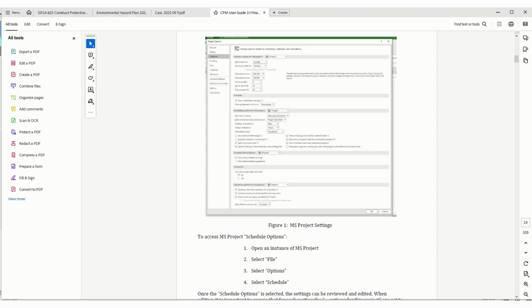It starts showing you your work elements, your labor resources will be here once we put the resources to it, your tools, your equipment, what materials are due, if it was a long lead item, all your QC points for this CAS sheet, your safety points for this CAS sheet, and the environmental protection plan for this CAS sheet. Okay, and then each CAS sheet will have a blank. This way it doesn't interfere with the last CAS sheet like it did once before. So that is how you build a CAS sheet in CPM.